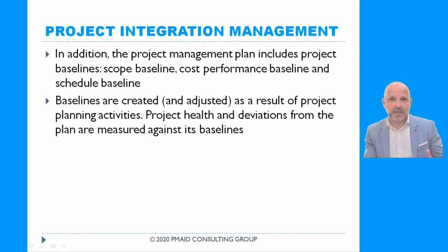So the baseline is the final plan. For example, schedule baseline is the final project schedule. And if we see that something needs to change, we adjust the baseline. Of course, it goes through the change request. We'll see what the change request is in a moment. So the baselines can be adjusted, and then the latest baseline becomes our actual baseline.